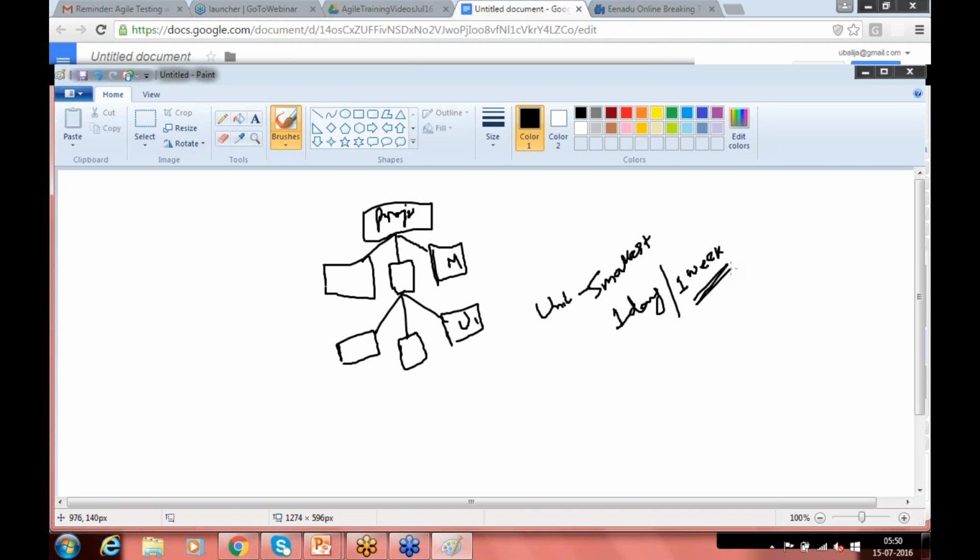So even sometimes we used to go a deliverable up to 1 week as well. But it is the smallest component in the system. We cannot further divide, and that is what it is going to take 1 week. Since you got the whole project requirement in the beginning, and that has many modules, and the modules can be further divided into units, and the unit used to be allocated for the developer. But in Agile, this 1 week is too long. In 1 week, we may complete 25% of the project work. And if some things go wrong in this 1 week, we cannot control.